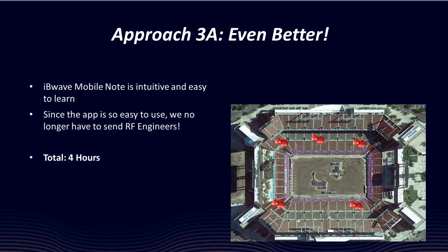iBwave Mobile is extremely intuitive, very easy to learn. Because of that, we were able to get our technicians who typically install and optimize these networks to start doing the site walks on our behalf. And it still took the same amount of time, but now we're using much more plentiful resources, and we're using resources that are typically located much closer to the venues than our RF engineers tended to be.